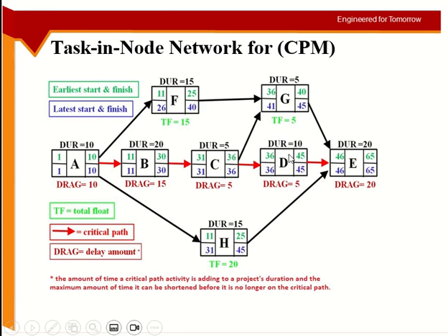Now from here I have 41, and I can go here. I have 36 here, and I can go here, and here as well. So from 41, if I go here, 40, no problem, I don't have any other arrows here. But if I put 40 here, I have another arrow, so I have to look at this one as well. Will it meet this condition? No. From 36, the previous day will be 35. So I'm getting 40 from here and 35 from here.